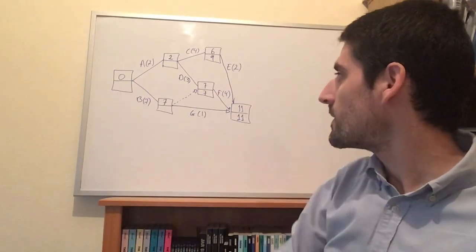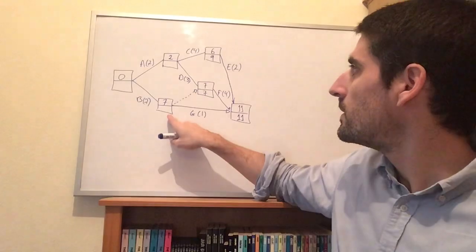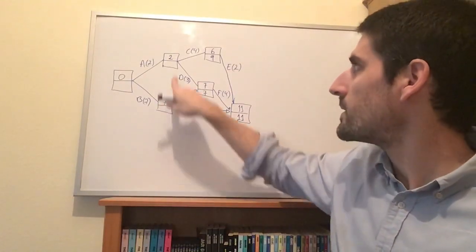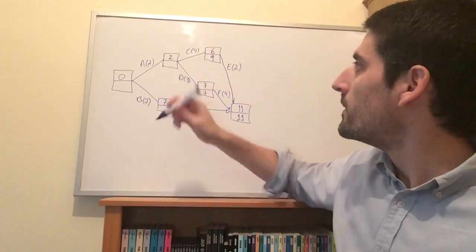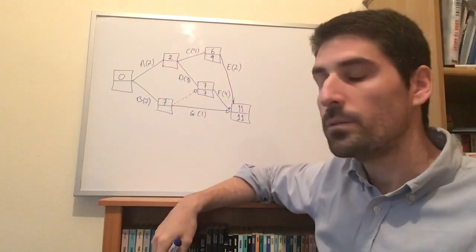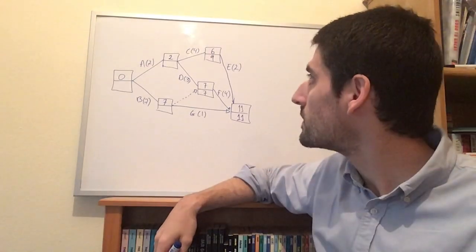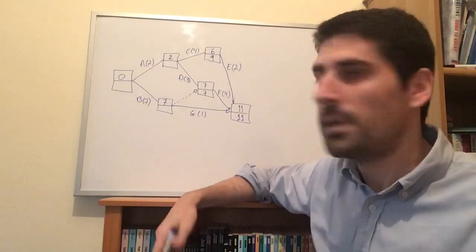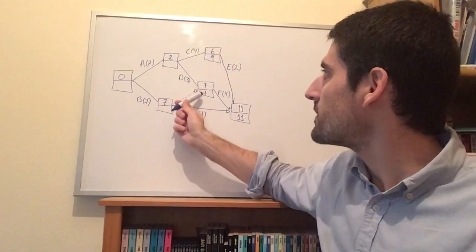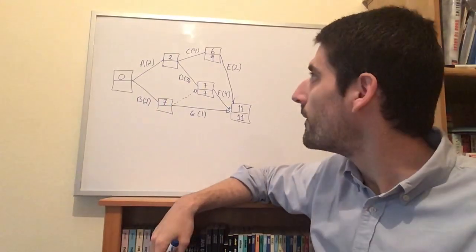So that's there. Now let's do that one there first. There's two ways to get here. 9 minus 4, which is, I can't do this, I don't know what's going on, 5, thank you. And 7 minus 3, which is 4.